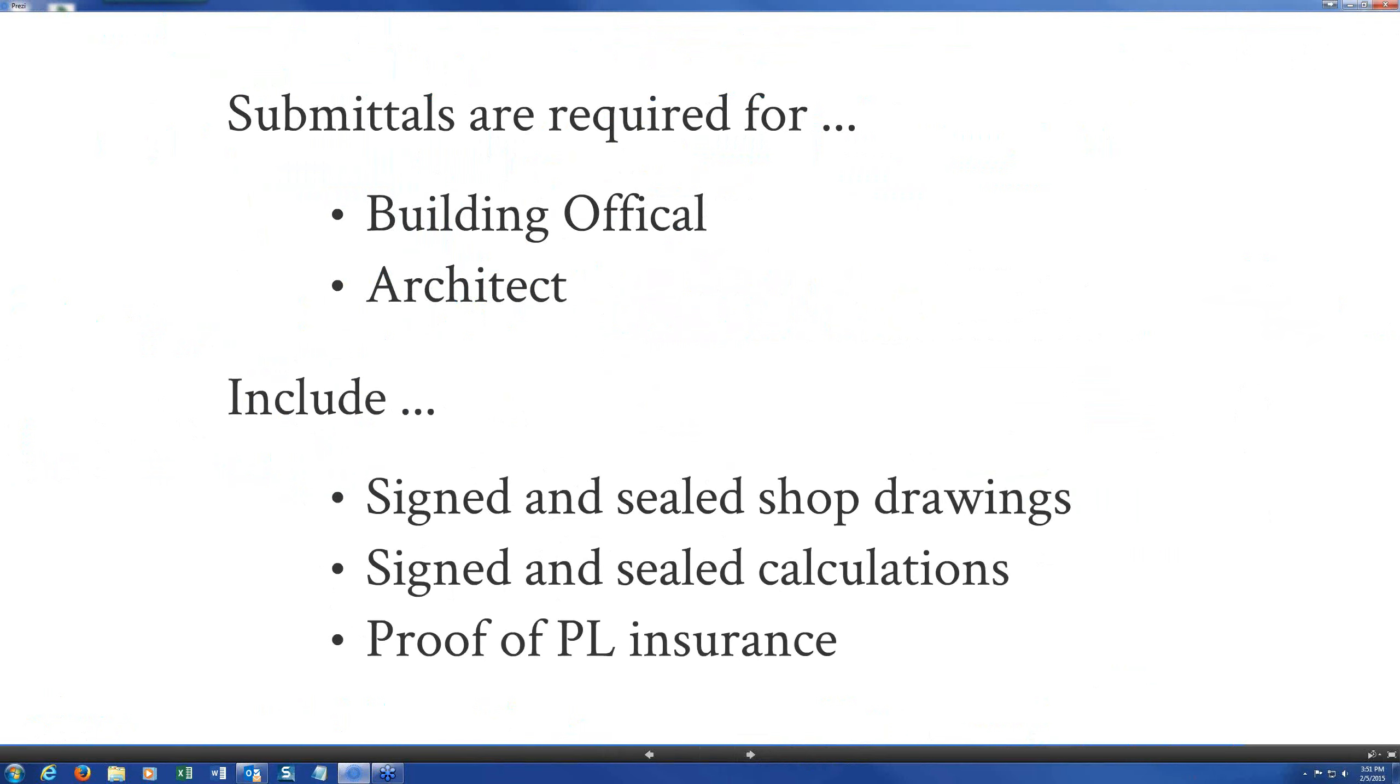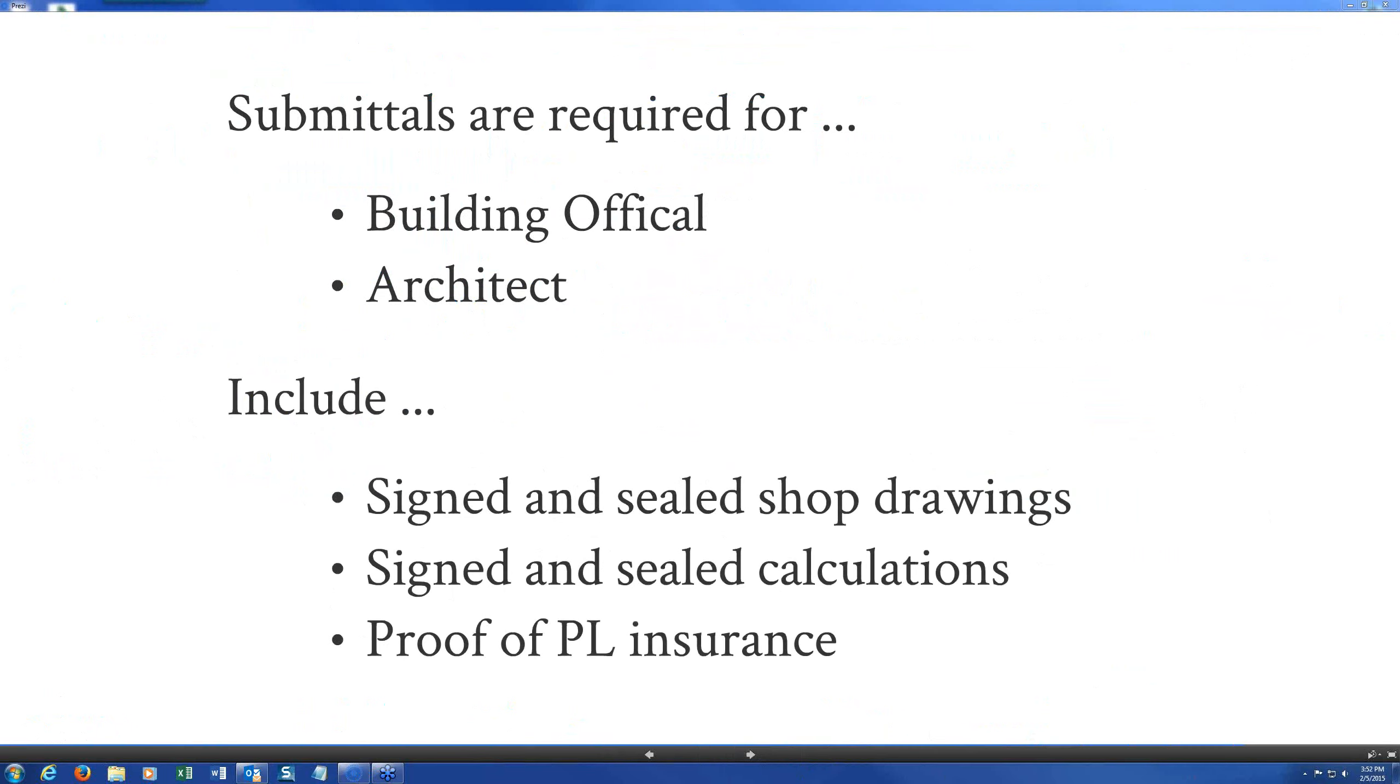Because they are assuming the same kind of risk that the architect is providing or assuming because of the delegated design. Now do you feel like that's really important for, let's talk about curtain wall since that's been our primary example throughout this. When we have a major manufacturer that has engineers on its staff and they're going to back up the design, and ultimately there's a shared responsibility between the manufacturer, the employer of this engineer, and the engineer personally. Do we still need PL insurance? Absolutely. Because whether it's, in this case if you're talking about a curtain wall manufacturer, the manufacturer should have PL insurance to cover the design that his employees are providing. And the GC should also have a PL insurance policy covering the subcontractor. It should all flow downhill.